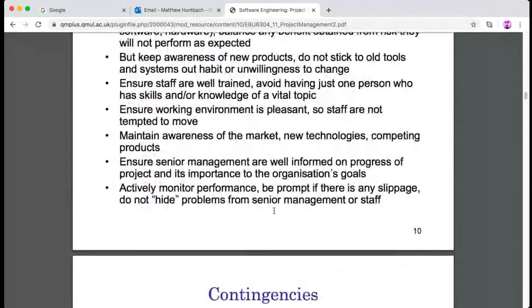Well, Agile in some senses works differently, because Agile has frequently produced versions of the code that are put out. It's not so much about separate quality management, but Agile has a very big emphasis on testing. Always test, have lots of tests to check that the code works, and every time you add a new feature, run all the tests again, automatic tests, to make sure it does not cause an error.